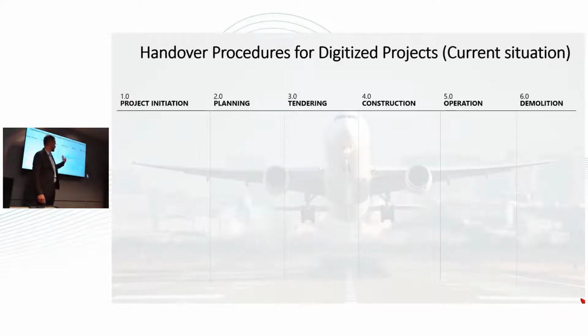When construction is finished, we in operation know that within up to 3 months we need to open the asset. We have to deliver the documents to all the departments, for the renting areas, for security, and for the technicians, so that they can train already how to operate and repair things. 3 months is not enough time for that. Usually 3 months before opening, you don't get anything.